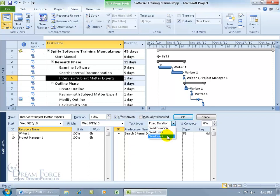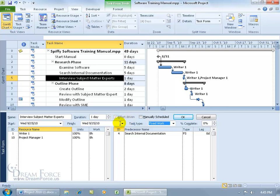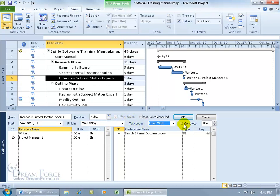And then you've got fixed work which by default is always going to be checked, you can't uncheck it. So with fixed work you can have 16 hours of work here between the two and increase the duration to 25 days and it will be 16 hours of work in 25 days, well that's fun. In any case, I don't want this to be changed so I'll click cancel.